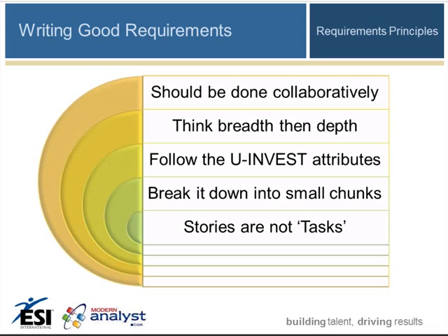E in INVEST is for estimatable. If we cannot actually sink our teeth into a defined requirement, a defined user story, and provide some estimate around the level of effort or labor required to build it, then it doesn't really represent a good requirement. It may be necessary for us to step back from it and redefine it in tighter terms so that we can get to that level of estimation.